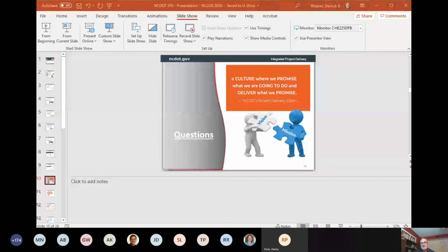Yes. So the big thing there is looking at this change management that we're talking about: how are we going to go about getting that approved? And the big thing, and we've talked about this a lot, and other states do this, is that the budget that you're set and the scope of the project that's set, that's what it is. And if you want to expand that, then there's a process to go through. And so that's what we're talking about with trying to have this change management. And right now there are some processes in place for when a scope changes early in the process, and if the cost increases by a certain percentage, or if the scope increases by a certain percentage, then there's a process that's supposed to be followed.